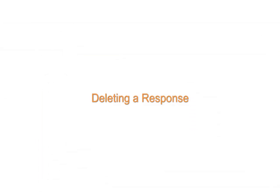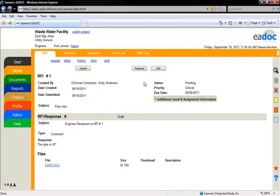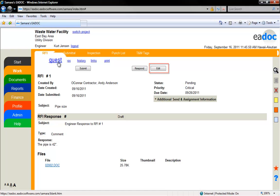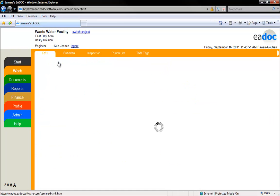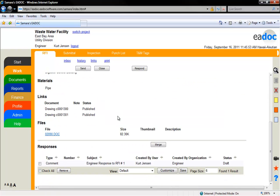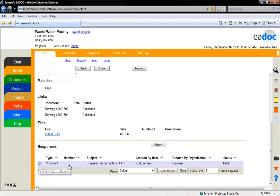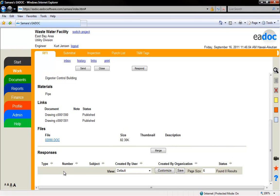As long as your response is a draft, it can be edited or deleted. To edit, click the Edit button. To delete a response, click the blue Request button to go back to the RFI. Scroll down to the bottom of the document to see a list of responses. Check the box to the left of the response and then click the Remove button. The response is not recoverable.